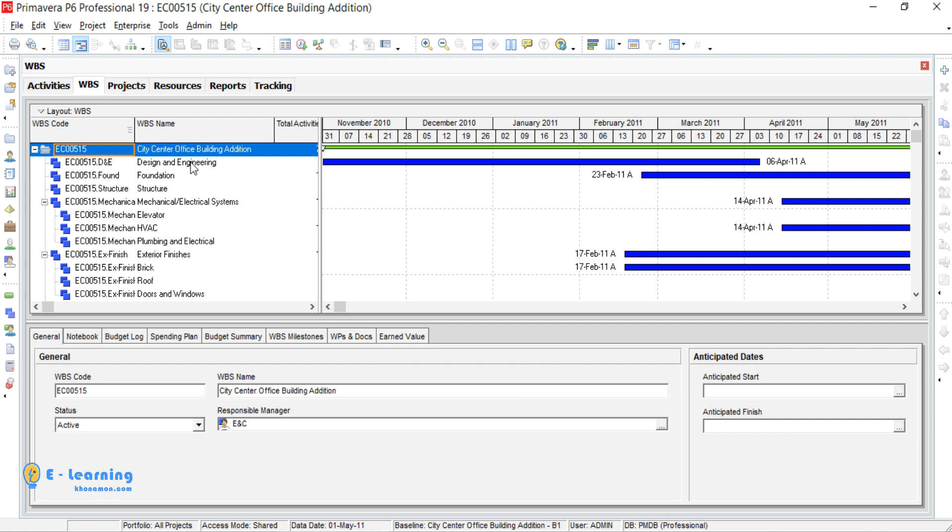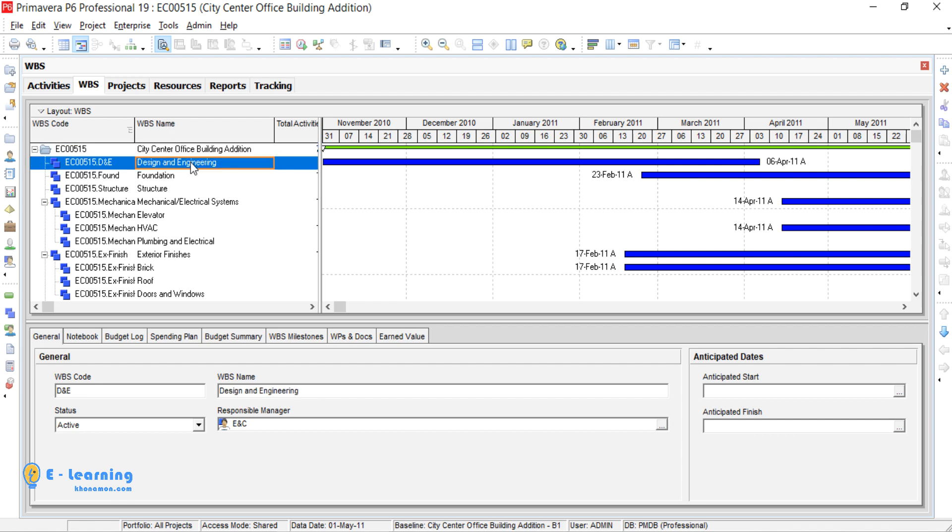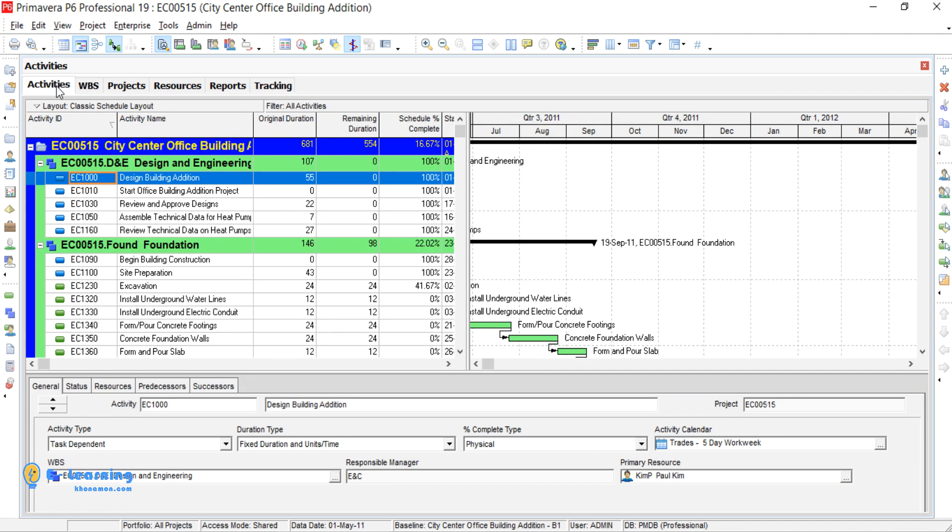For example, in WBS tab, it is Design and Engineering. If I back to Activities, I see the subset of Design and Engineering WBS is these five activities. It means, for finishing Design and Engineering WBS, we need to finish first these five activities.